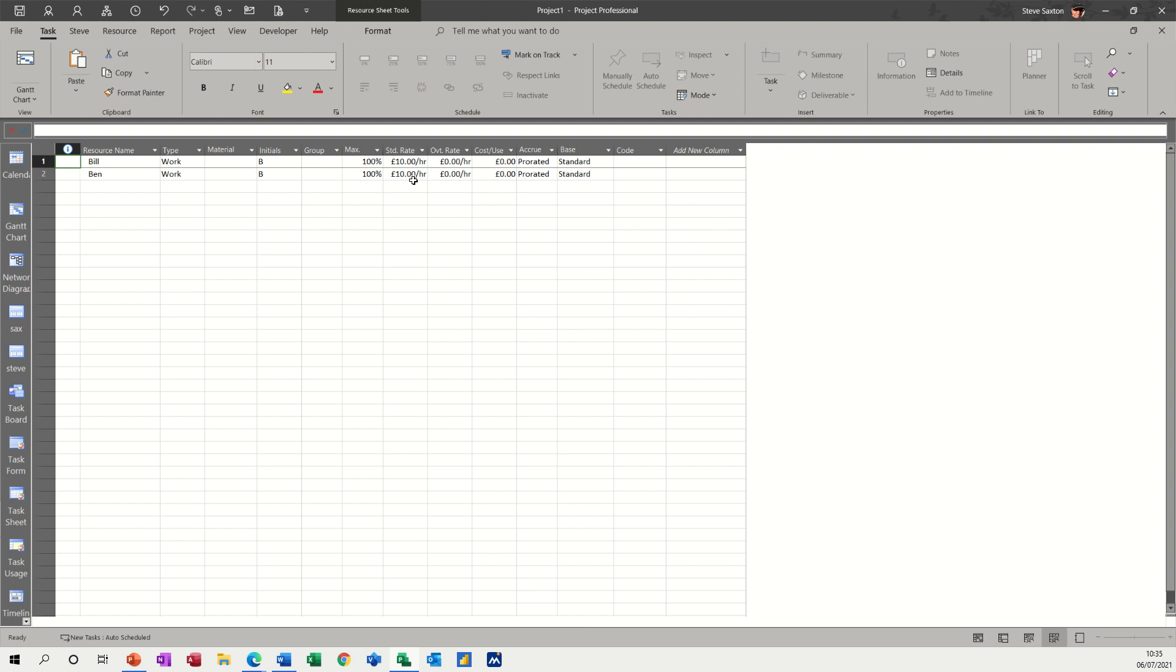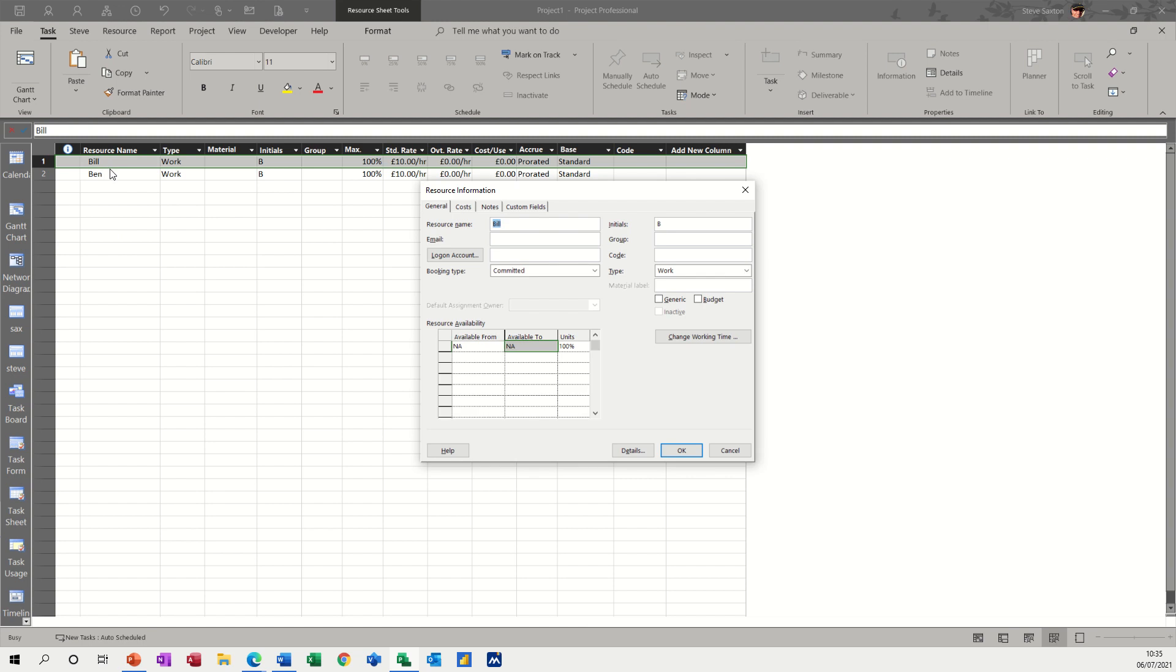So to adjust the availability of a resource, basically you need to double click into the resource and you've got this option here, available from, available to. You can also adjust the working time as well.